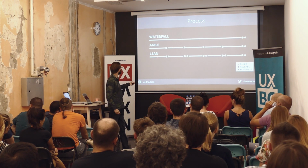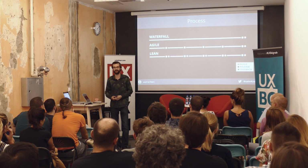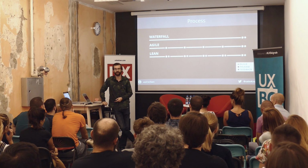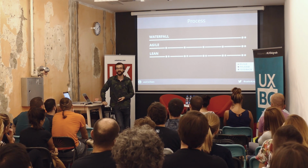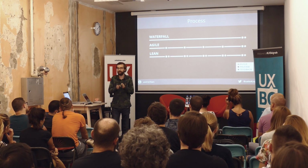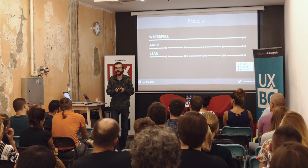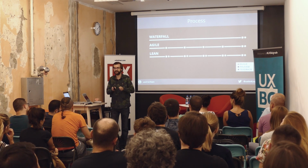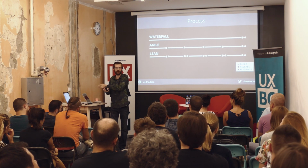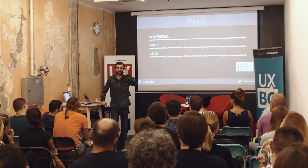That first little cycle there, this one up front, you'll commonly hear this referred to as an MVP, minimum viable product, a cool little buzzword, but it does have some weight to it, and what it basically says is what is the minimum amount of building and design and whatever that you have to do in order to have a viable product that is ready enough to release and actually get data that you can trust. And the key word there is viability. That's where a lot of people misinterpret what the MVP means.